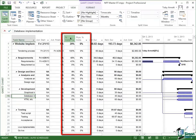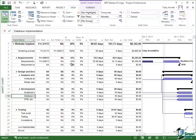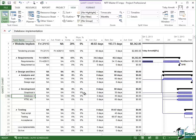You'll see that there are two columns in the tracking table, percent complete and physical percent complete. At the moment physical percent complete says zero for everything whereas for tasks that have started or indeed started and finished we've actually got percent completes that are non-zero. As a matter of course when Project 2013 is doing its calculations on how the project is going, it uses percent complete values based on how far through each task you are. If you've got a 20 day task and 10 days have elapsed it will assume that you've done half of the work.